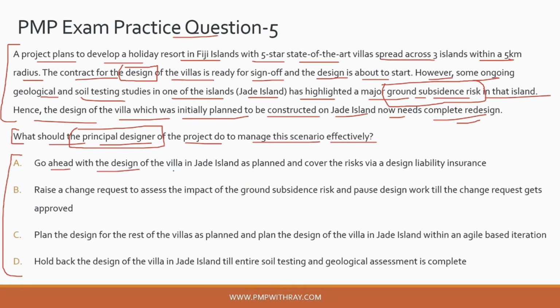Go ahead with the design of the villas in Jade Island as planned and cover the risks via a design liability insurance. Now, this is a project management specific term, guys. So you need to understand what is a design liability insurance. Okay, so this design liability insurance is a classic example of a risk transfer.